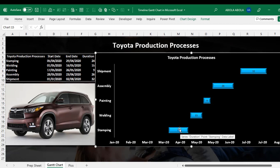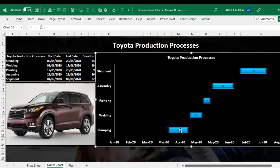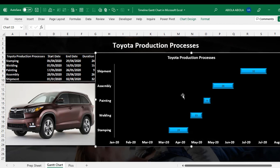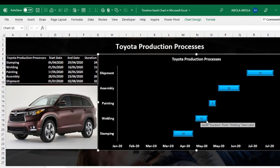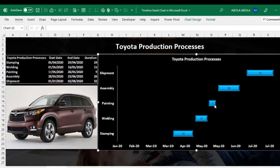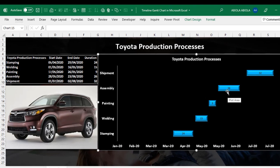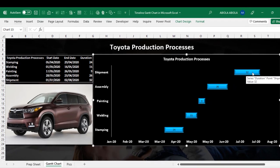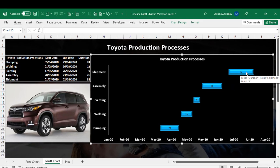You can actually just check each of the series. You can actually see that this actually points into Duration. And this is Stamping. So Stamping requires 24 days, which is accurate. And the Welding requires how many days, 15 days, painting, 9 days, assembly, 26 days, and shipment, 32 days. So this is how to create a timeline Gantt chart in Microsoft Excel.